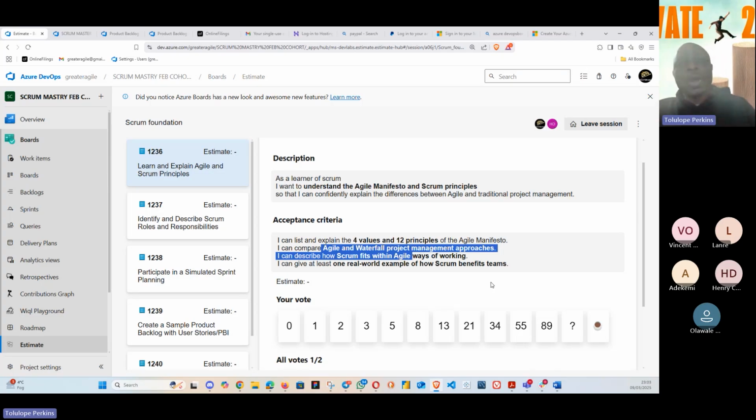For example, if a senior developer says this will take us 5, you find out that there's an unconscious bias, and everybody will tend towards 5. But we want everybody to vote anonymously. Anonymous. Thank you.